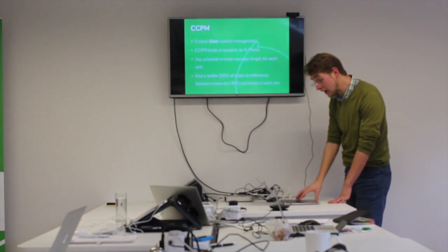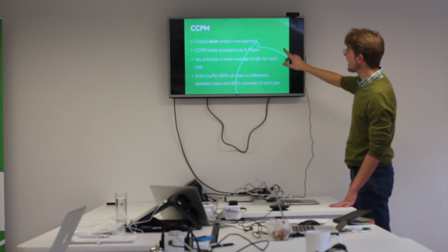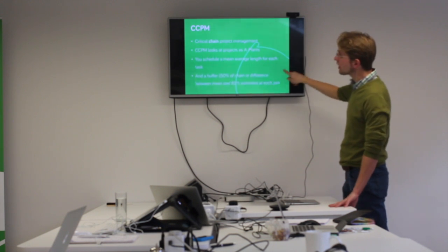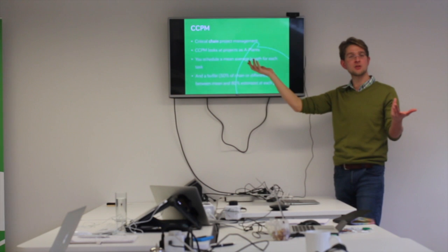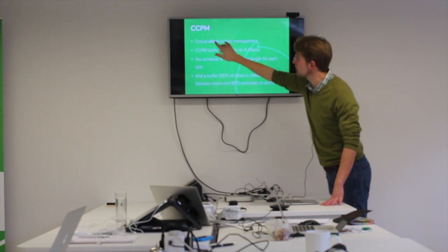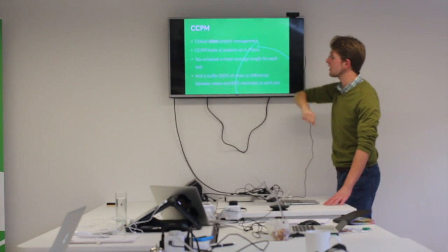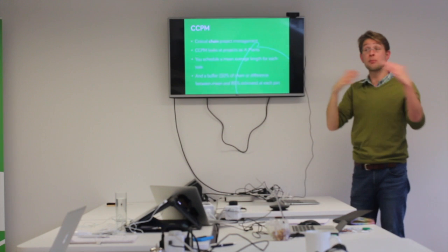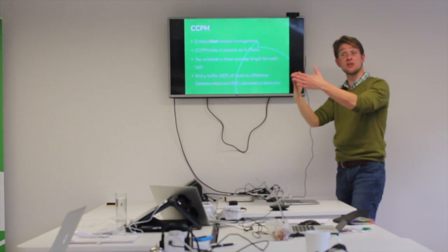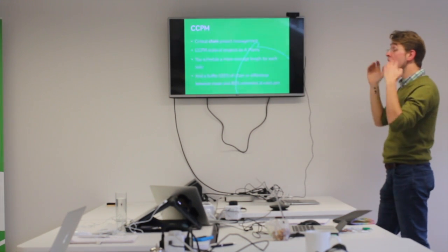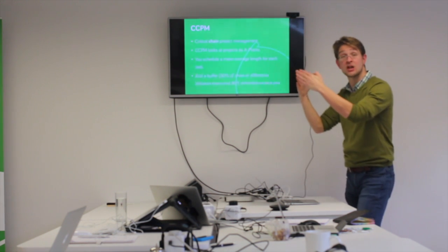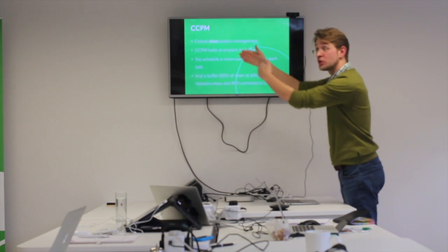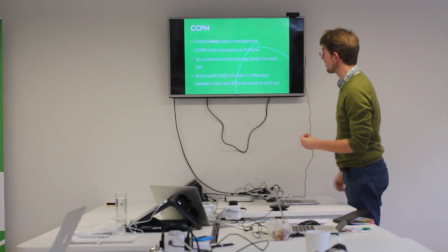Yes, covered that. Oh yeah, so in terms of the way that we work, there's an extension to this theory which is called critical chain project management. And this is critical chain project management, not critical path project management. And it basically says, a project is like an A plant. It's a workflow in which you have a series of processes which come together overall to make your finished product.